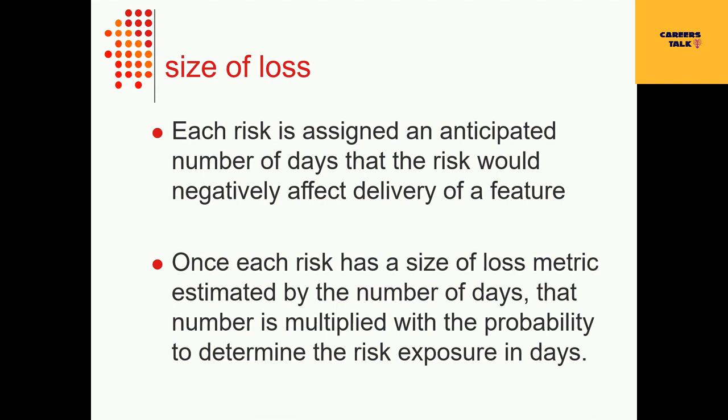As a next step, each risk is assigned an anticipated number of days that the risk would negatively affect delivery of a feature. If a feature does not have well-defined user stories and has been accepted into the next sprint, there could be a risk of delay in the number of days it will take to deliver the features. Once each risk has a size of loss metric estimated in days, that number is multiplied by the probability to determine the risk exposure in days.